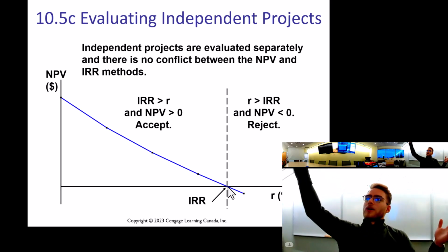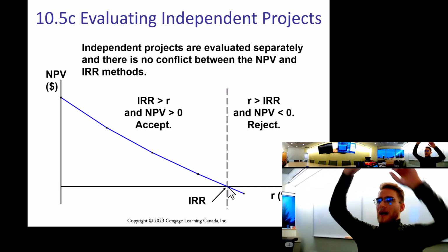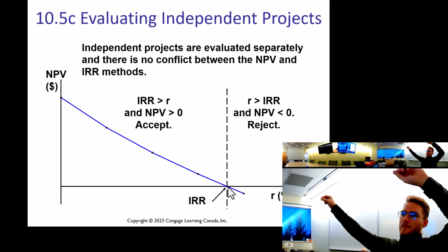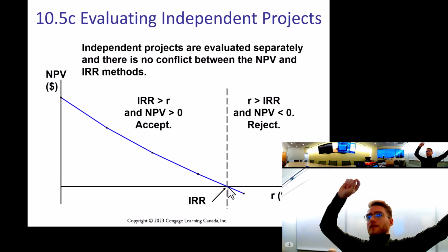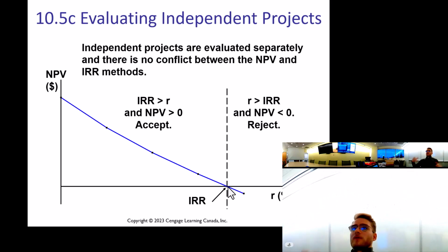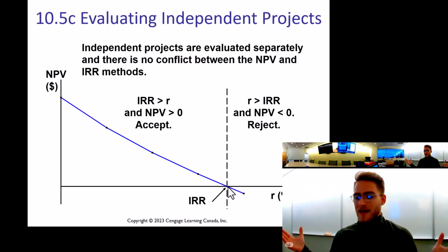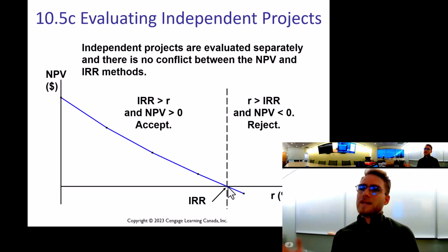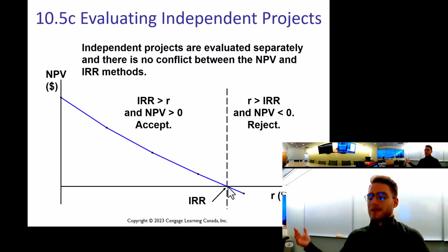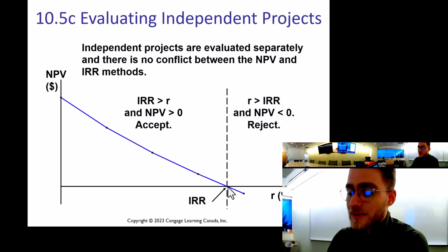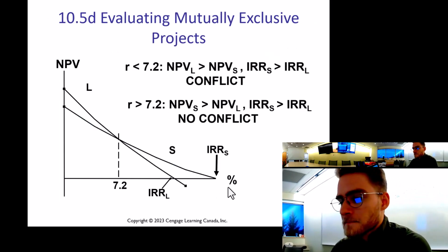You set a hurdle rate of 9%. Any project under a 9% rate of return, you're not going to pick. But any project over a 9% rate of return, you're going to pick because you're going to be profitable. That's without all the mathematics and the complications. If your returns exceed your cost, you'd pick it. That's all this is, honestly, once you get down to it.